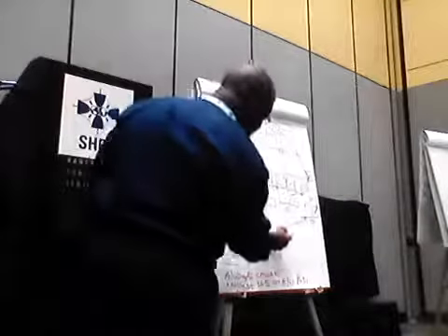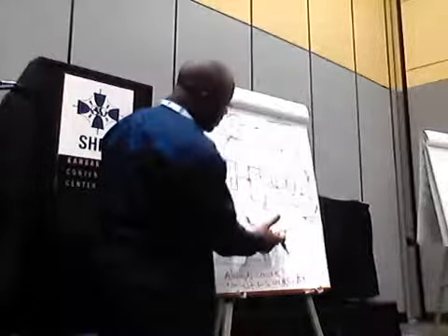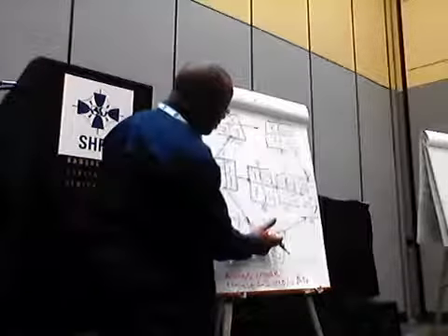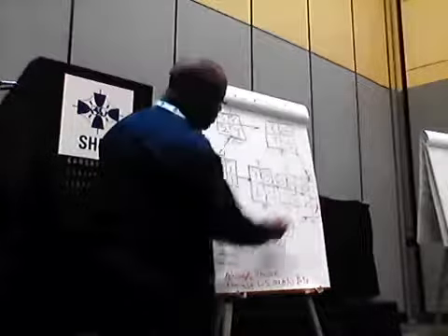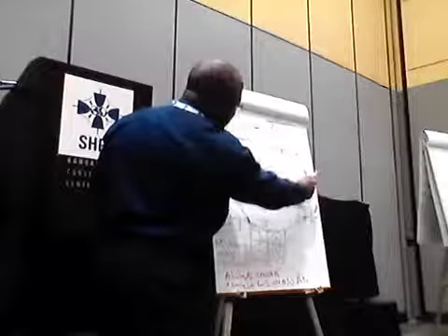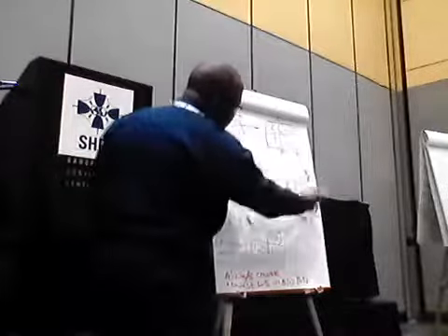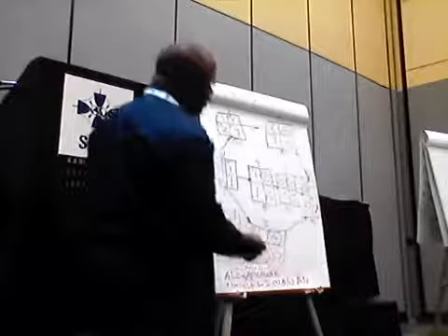But this one right here, I can delay this by how many days or minutes? How many minutes can I delay this by? 11. Good. The late, or the early start minus the late start. Early start of G minus late start of F.